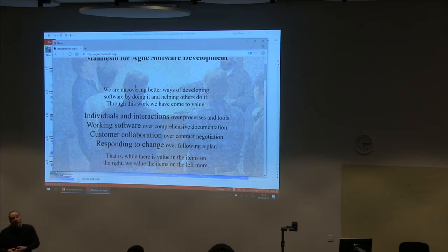what you're going to have to do is come up with a methodology. And it's quite appropriate to say, okay, I'm going to use a methodology that takes this aspect of DSDM and this aspect of Scrum and this aspect of XP or whatever, and this is the methodology I will use. You don't have to just pick something off the shelf. You can design your own, as long as it is systematic and it is demonstrably what you did. And as part of your proposal, ideally you should be talking about a methodology. So you should have some idea of that by now.